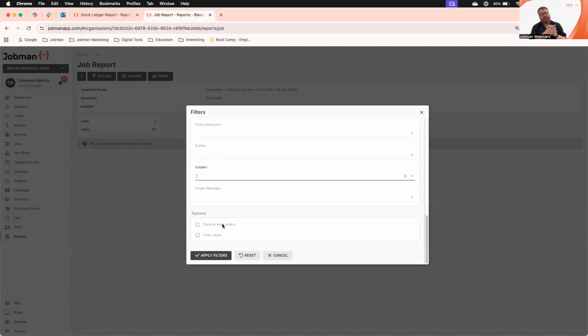So especially in the job cost report, if you have, say, a $1 million project or a $500,000 project and you've broken it up into 20 work orders, option one is run the report, hide the work orders, and it will just wrap all that information up into one job number. We estimated $500,000. We spent 200 grand on materials, 200 grand on labor operations. Should have made 100 grand. Happy days. Actually, I was expecting to make more than that.